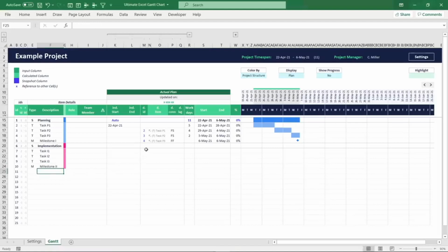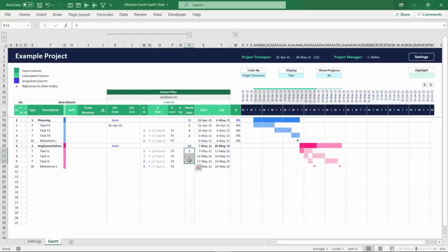What is really amazing, with this dependency engine, you are not limited to creating dependencies within a stage, you can also make stages dependent on other stages. For a forward-oriented stage dependency, for example, you only have to make the initial item in your stage dependent on another stage. Then, a set of standardized formulas allows you to make the stage update based on its items. And finally, you can make the other items consecutively dependent on that initial item, define the number of workdays, and make sure that the milestone ends together with the preceding task.